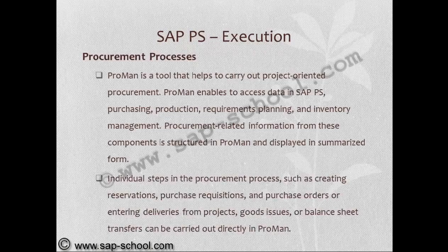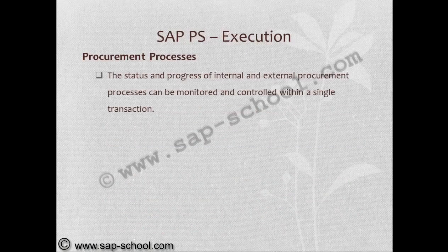Proman is a tool that helps to carry out project-oriented procurement. Proman enables access to data in SAP PS, purchasing, production, requirement planning, and inventory management. Procurement-related information from these components is structured in Proman and displayed in summarized form. Individual steps in the procurement process, such as creating reservations, purchase requisitions, and process orders, entering deliveries from projects, goods issues, or balance sheet transfers can be called directly in Proman. The status and progress of internal and external procurement processes can be monitored and controlled within a single transaction, that is Proman.